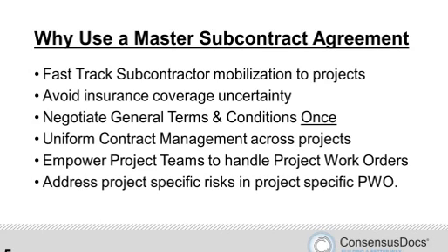It's true, and to implement this across our entire company or any company really is nothing more than just sending out a letter that explains we're going to negotiate a master contract, and then we will send you project work orders, and it's very simple. And the next time you award a contract to a subcontractor, you just send the letter and a copy of the master contract instead of your standard subcontract agreement.